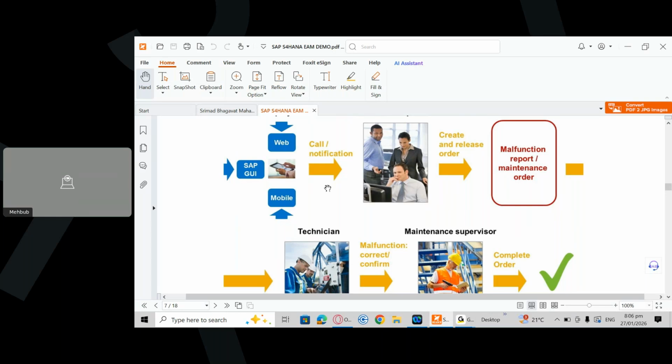If you want to manage the process, you need to use the user status, where you say we are in the planning phase, or once your planning is completed, you say planning completed, then you go to the next stage. But here in the new system you can define the phases. So your phase is the planning, and this phase itself can have multiple statuses to be maintained.